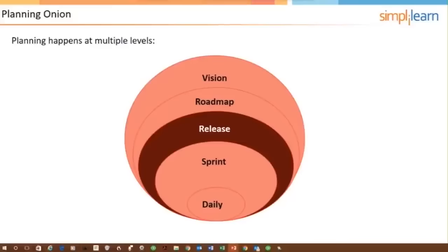My example of that website that I'm working on has three versions, which make up the product roadmap. Version 1 is the free site, version 2 is the membership site, and version 3 is the pay referral commissions version of the site. And the product roadmap is then supported by releases. So for my project, I have three releases. All of the user stories needed for the free version are in release 1. All of the additional user stories that are needed for the paid version, the subscriber version, and then also for version 3, those are all releases, three releases.